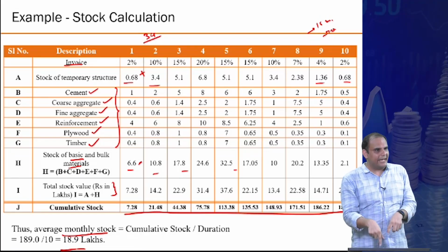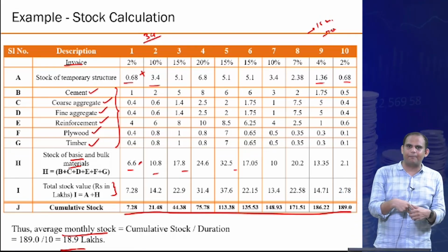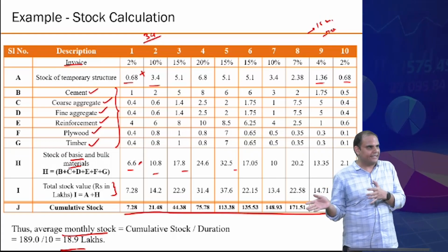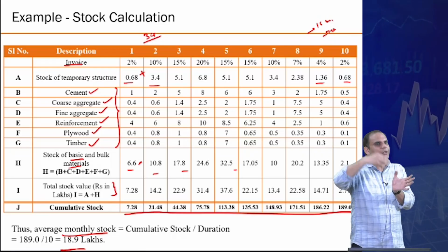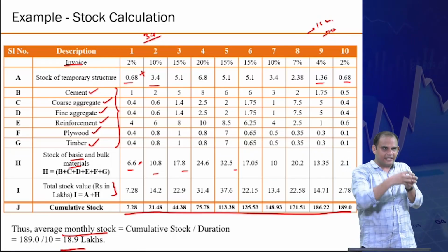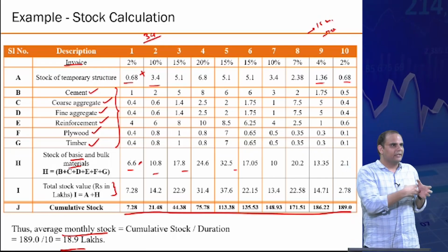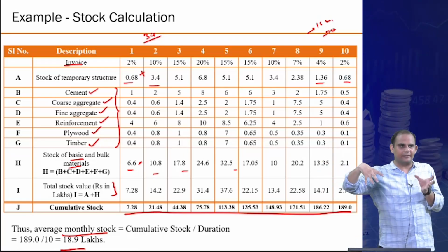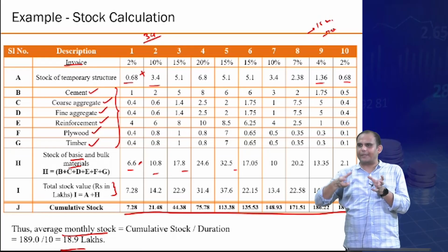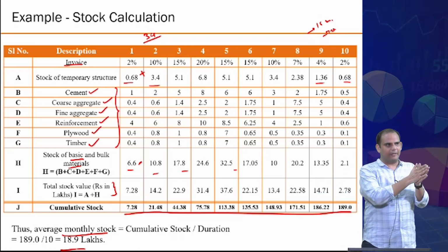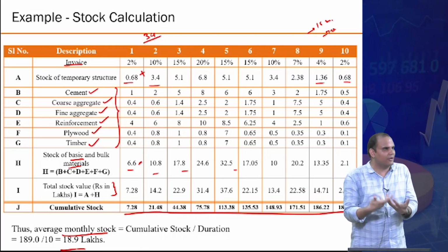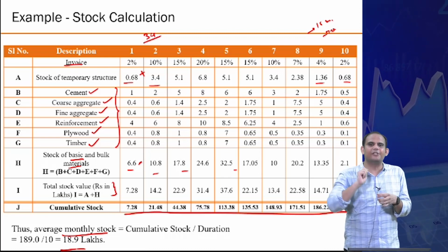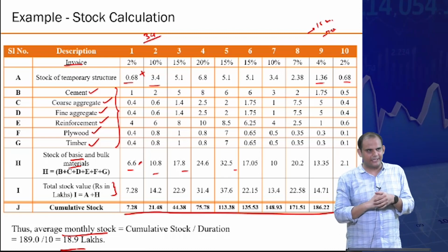Or you're buying all these raw materials, you might need to pay for every 10 days or every week, right? They do not wait for a monthly cycle. So this gap between your income versus your costing keeps on increasing to a certain extent in the beginning of the project. And that is called working capital. Finally, this cost will be recovered. It is not an extra cost to you, but during the project, you need this much money to ensure the smooth operations of your business, right?